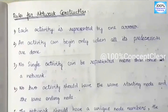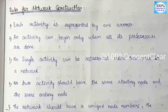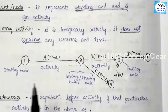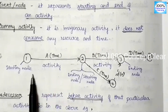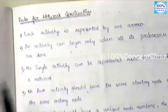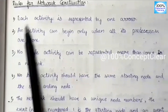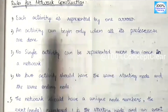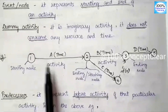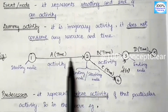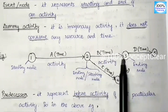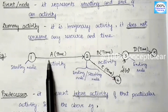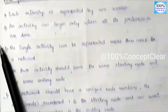Next, we discuss the rules for network construction. The first rule is: each activity is represented by one arrow mark only — one arrow mark represents only one activity. Here A, B, C, and D each have their own single arrow mark.